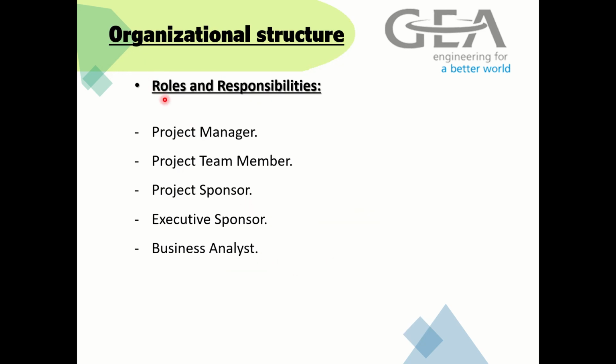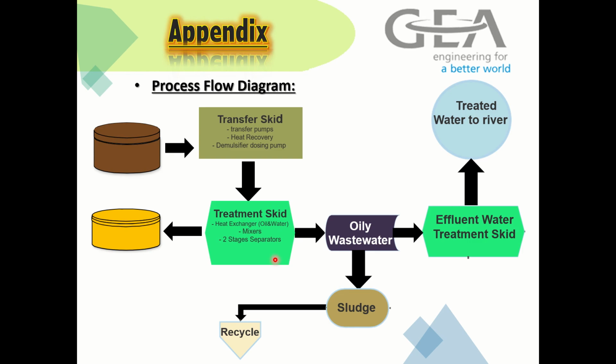Also the roles and responsibilities for project manager, project team member, project sponsor, executive sponsor, and business analyst. For example, the project sponsor approves the project budget, the executive sponsor approves all changes of the project scope and provides additional funds for scope change, and the business analyst gathers requirements from the business unit or users and verifies that project deliverables meet the requirements.